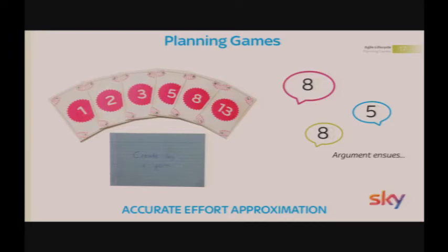And there are different scales that you could use. For example, some teams use t-shirt sizes, small, medium and large. It all has the same effect. The idea is it's an abstract scale. And you also get more of a feel as you progress through sprints on the relative size of each card and what each card means in terms of size.